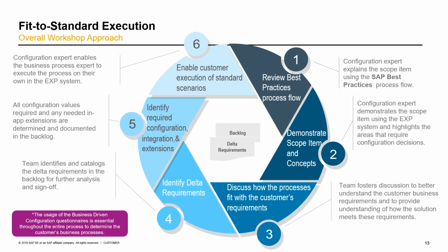As the Fit to Standard is a key component in the SAP Activate roadmap, we are going to go into a little more detail. One of the most important parts of this process is the business-driven configuration questionnaire. These questionnaires help identify key values and if any Delta requirements exist early on in the process.